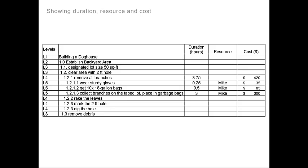The duration will then be added up for all the activities or subtasks, giving your level four task a total duration along with a total cost.